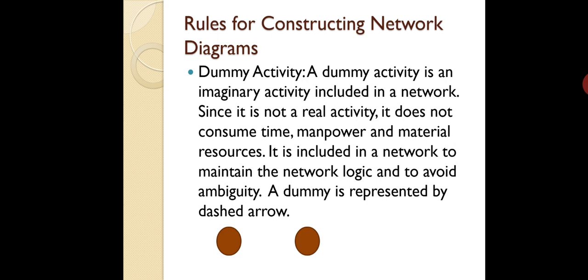Then what is a dummy activity? A dummy activity is an imaginary activity included in a network which is required just to maintain the logical sequence. Because it is not a real activity, it does not consume time, manpower and material resources. You can check my video on dummy activities to understand the concept and how we introduce a dummy activity in a network. A dummy is represented by a dashed arrow.